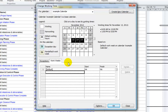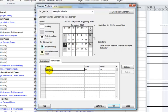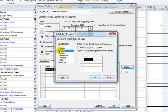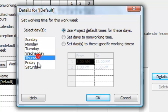The default work week sets weekdays as working days and weekends as non-working days. If we click on the first row and click on the Details button, the details show that Sunday and Saturday have no time. However, if you hover and click on Monday or Tuesday, you'll notice that there is time already filled in by default. To set up a new work week, here are the days we have currently defined as working days.